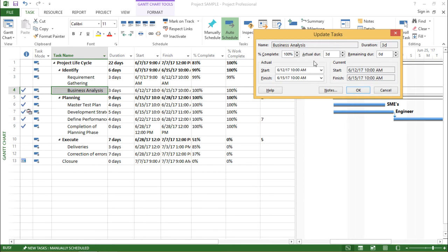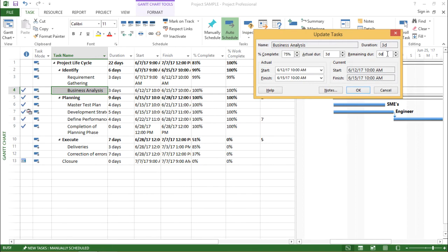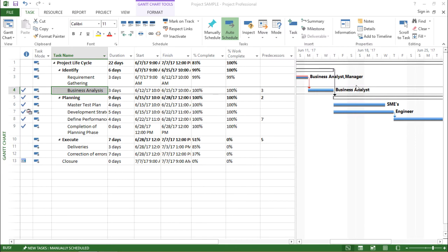So what I'm doing out here is I will decrease the or I'll reduce the percentage complete. Let me make it to 75% by keeping the actual duration as constant without touching it. So I'm keeping it as three days and I'll keep this as zero days. Rest of my details will remain the same. So let me hit OK. I'll click on the OK button.